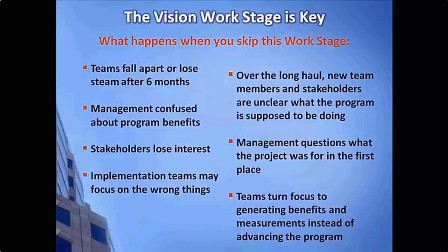Let's just get started. So they went down the path of doing a lot of the process implementation work, and lo and behold, about 7 months into the project, there were some changes in management, and some of the new management came back in and said, why are we spending $1 million on this ITIL project? What are we really getting for our money? And as a result of that, the team literally stopped all the implementation work that they were working on and started to scramble, collecting metrics, putting reports together, building a business case, trying to justify why the project was started, kind of in reverse. Really a waste of time when you start to think about how that worked.